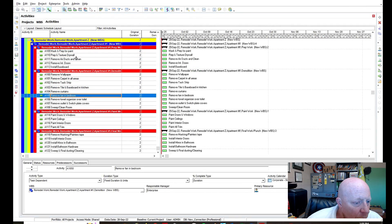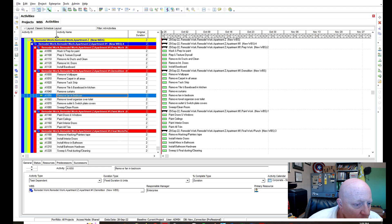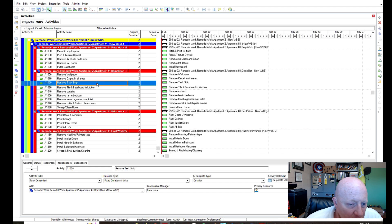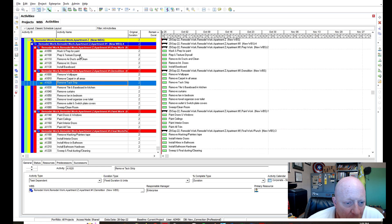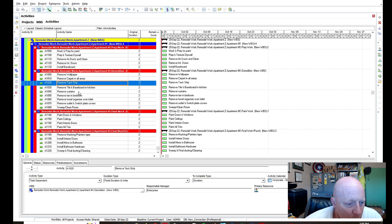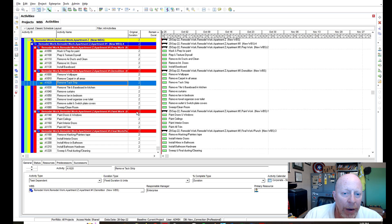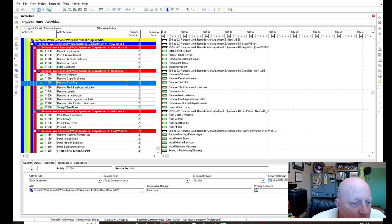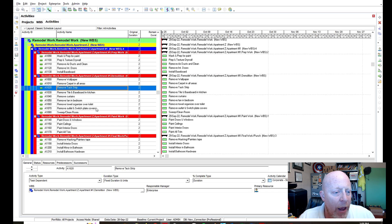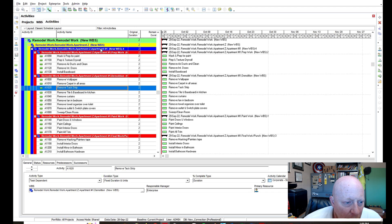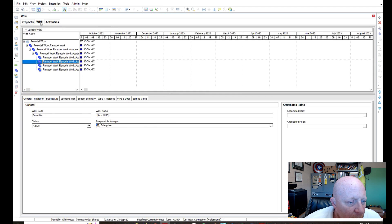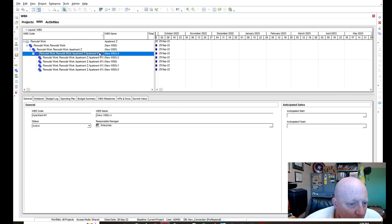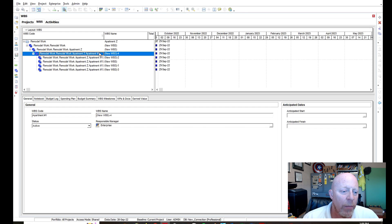All right, so I went ahead and labeled everything. So you just didn't see me have to type in everything. And what I did is I changed my original duration to two. It was at five. I changed it to two days. Obviously prep and texture drywall is probably going to take hours. Remove curtains, probably hours or less than that. So you always have to change your duration. Right now we're in days, but I have to change it to hours and minutes. The other thing I did too is I added one thing. Because with an apartment or a condo or anything like that, you're going to have several apartments, right? You're going to have several units. And so what I did right here is I added one. I went back to my WBS. And I added this one right here, which is apartment number one.